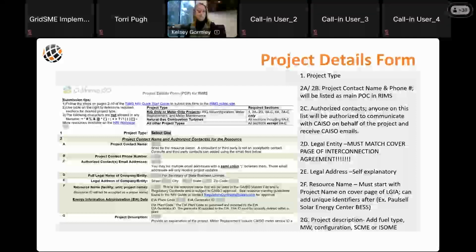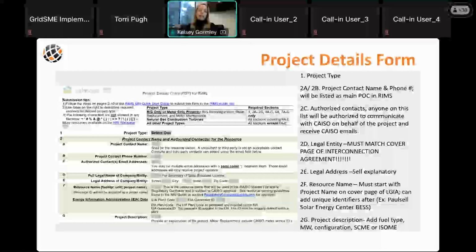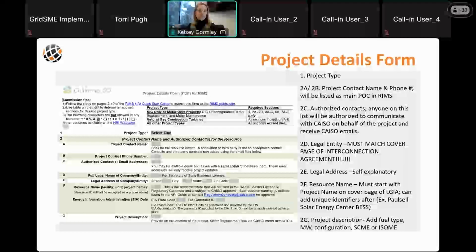So what does that mean to you all? Well, if you want to have more flexibility in what you end up naming these projects, be flexible about not putting the fuel type in the interconnection project name. So just name it ABC LLC. Don't name it ABC Solar LLC, because you never know in 10 years when you actually start to build the project what you're actually going to build. So that's something that I think would be helpful for folks to know on this call.